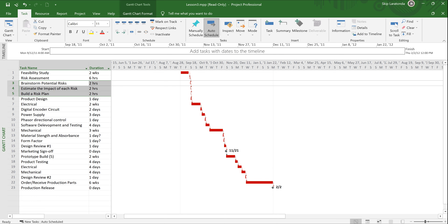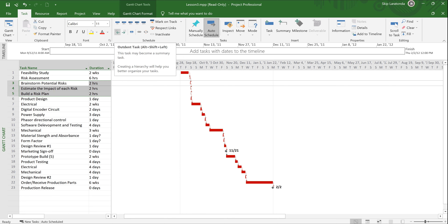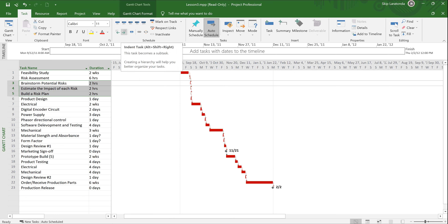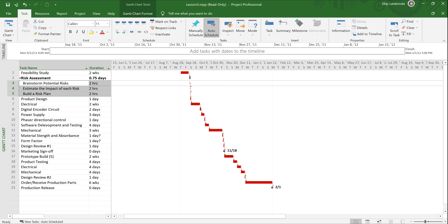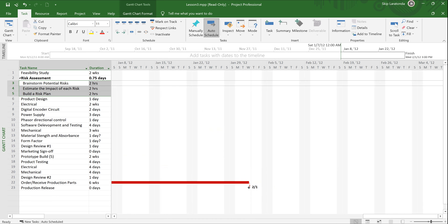The demote — remember the indent task is more of a demote because you're putting it under something — and the left arrow is the outdent or promote. I'm going to highlight tasks 3, 4, and 5 and hit the indent task button. Look what happens — they move under Risk Assessment, and whatever duration was in for Risk Assessment gets recalculated based on the duration of the subordinate tasks and their relationships. Since they're all finish-to-start, it comes to 6 hours, which is 0.75 days.